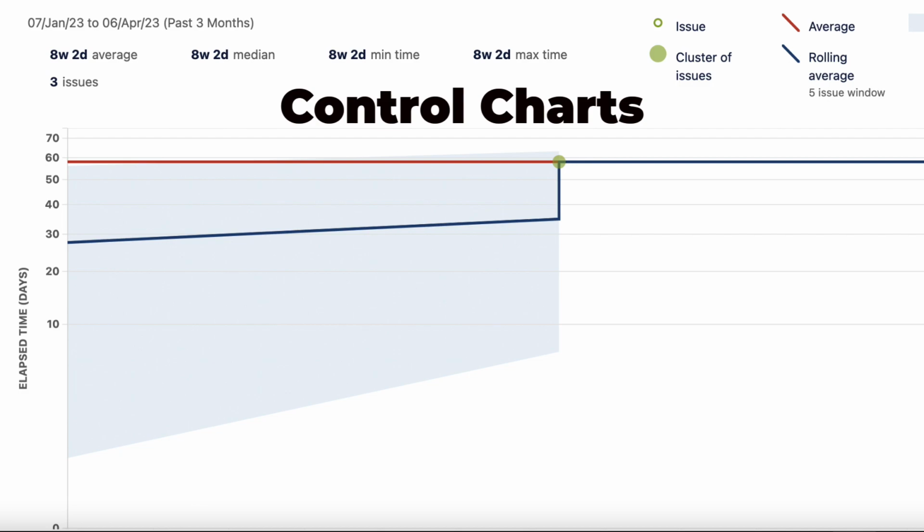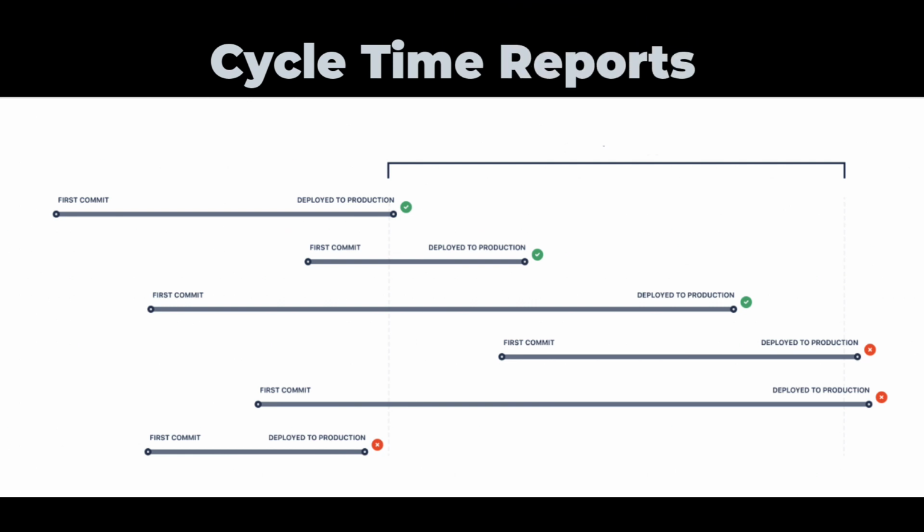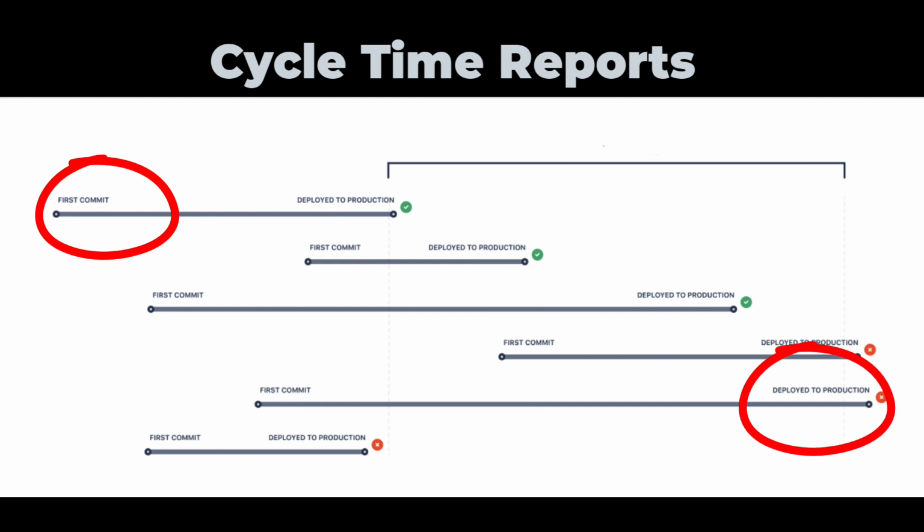Third report which you can use is JIRA cycle time report. If you have configured JIRA with DevOps, then you can benefit from this particular cycle time report. Cycle time report will again tell you the actual time taken by issues from the time the team started working on it till the production time. That is, the issues from in progress till done.